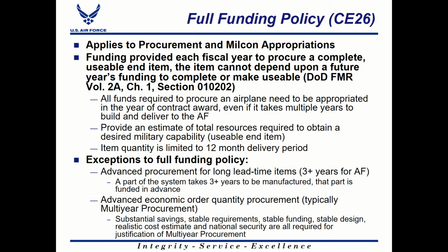For example, if we're buying a new GPS receiver for an E8 Joint STARS, and that same GPS receiver is being used on another platform, that doesn't mean it's a usable end item just because another platform can use it. The purchase is for a Joint STARS, and therefore that GPS receiver needs to be usable on a Joint STARS, as that's the intended purpose of that purchase.